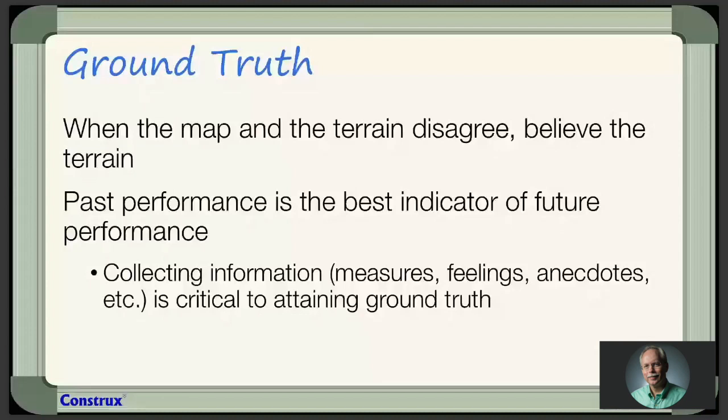Well, the tactic here, it's still a tactic, let's call it. But the truth here is that past performance on almost all our software projects is a relatively good indicator. It's probably the best indicator for future performance. I was just with a team 2 weeks ago, and they were working on issues, and they said, well, every project is unique. I said, well, then you have a good history of working on unique projects.